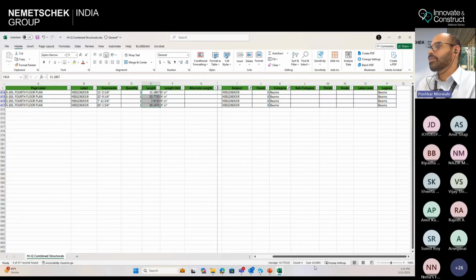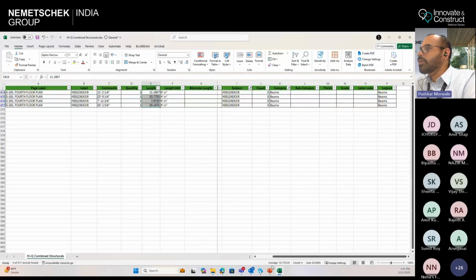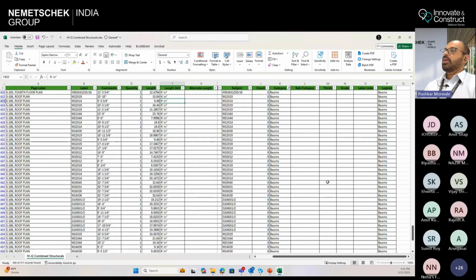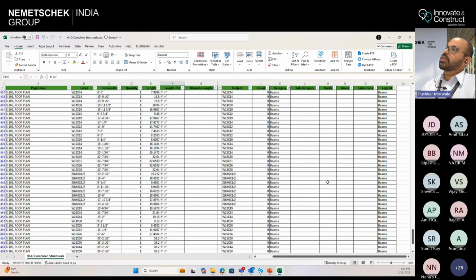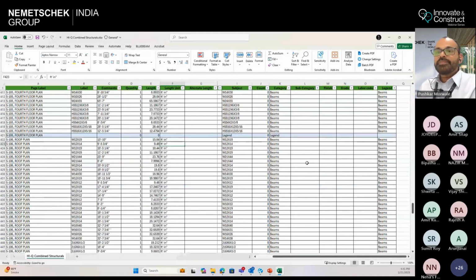So the length is, sum is there, right? Yeah, this is the sum, 63 feet roughly. Okay, so once you get such quantities or things marked in your document, it is very easy for you to filter out and get the estimation done. I think that was it. Oh, are there many more?